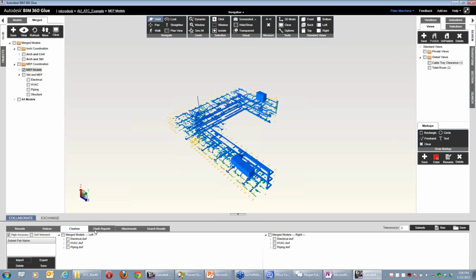So that way, if I'm working on this, I can look online, see, hey, everybody uploaded their file, every night, every week, every whatever, and I'm just going to run a quick clash and see where my work is. The benefit of this is that when you do still have those big meetings, you get everybody together, and rather than 200 or 300 warnings, you really only have maybe 50. Because all the other warnings people could take care of without needing to get everybody into a room. They can put markups, they can send emails, they can talk, but they're constantly able to see what everyone else is doing and review and coordinate and collaborate based on that.